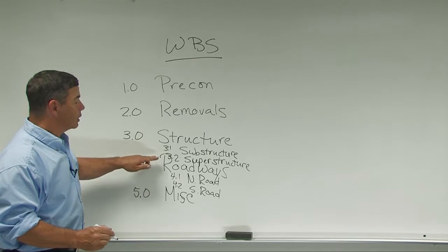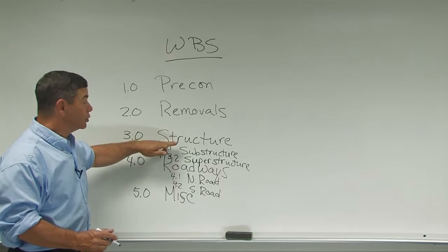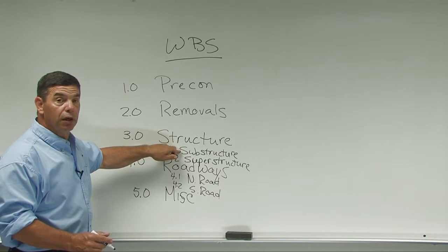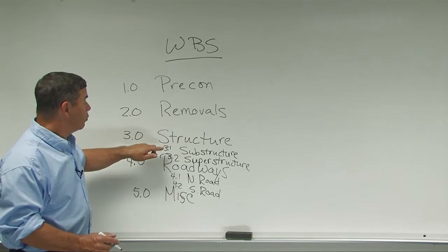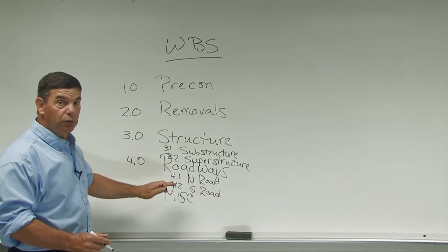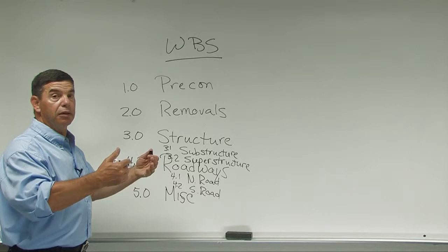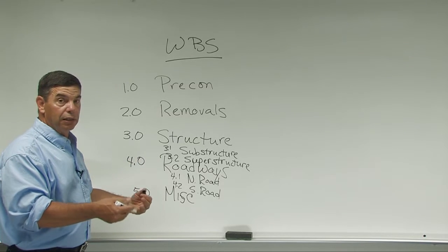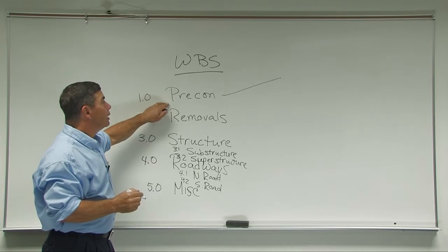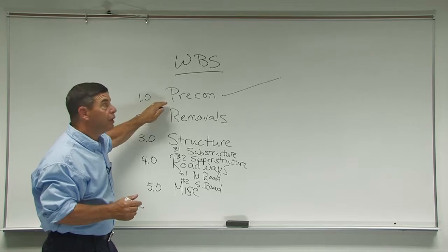The same pattern can happen for all of these. If this is a larger structure, we would do maybe each pier underneath the substructure, and that would then get a number 3.1.1. And it continues in outline format. Now, these aren't the tasks, they are like the buckets for the tasks that help keep our project organized. And they get a set of letters and a set of numbers.